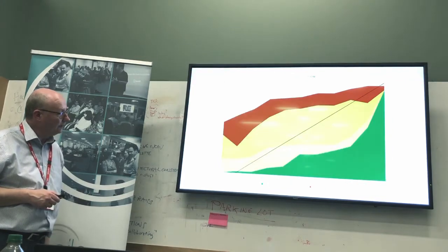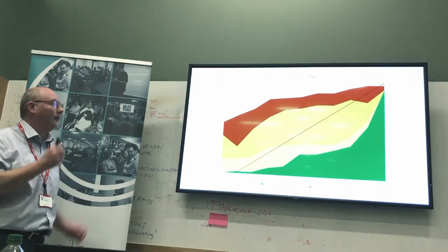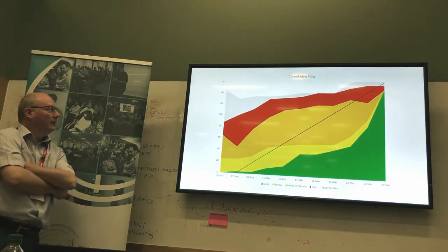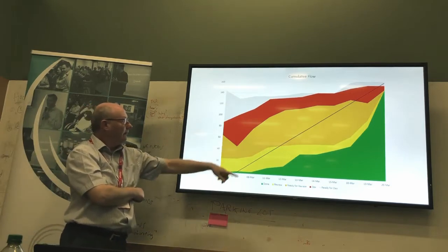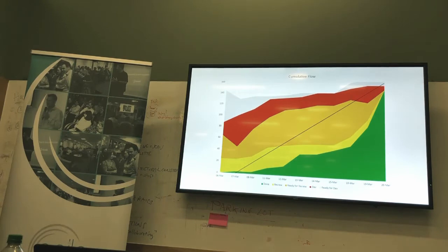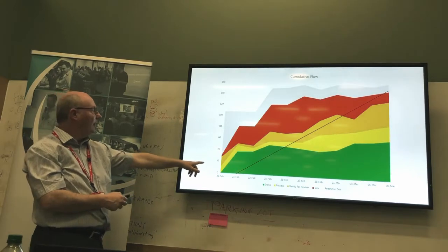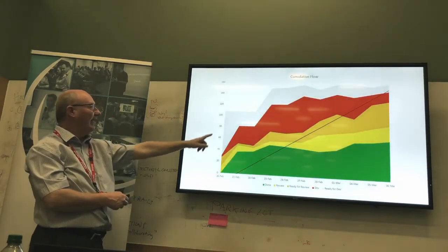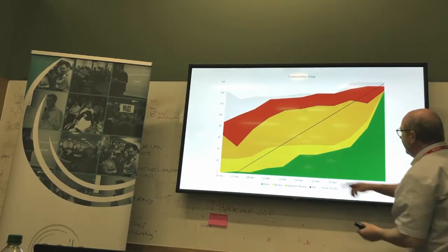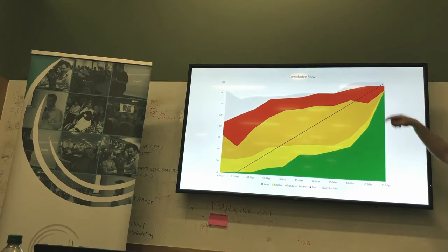So I think this is actually the very next sprint from the same team. You can see the same kind of pattern continues for a while. It looks like they've essentially had a 4-week sprint instead of a 2-week. So what's this at the end? They've been doing this, they've been doing that, which gets unfocused, and that gets worse, and then this. What's this all of a sudden? Oh, let's finish everything. Kind of like waterfall-style testing at the end. It's a release attempt.